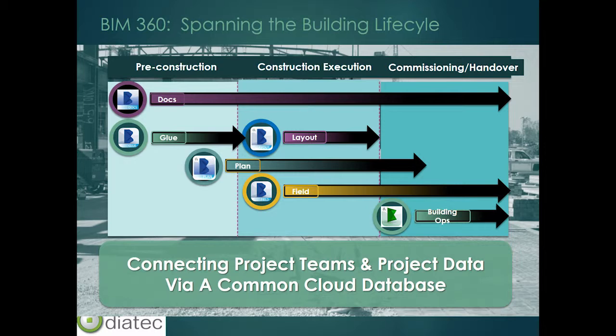Once we move to construction, Layout handles validation and verification to ensure as-built conditions in the model match what was pre-constructed, and identifies deviations on plan. Field starts to facilitate the rich data required for commissioning and handover — bringing information online for HVAC and MEP — that facility managers specifically will require to maintain and operate the building. And Building Ops takes all information generated up to this point and puts it in a format that operators, owners, facilitators, and occupants can use to manage and maintain the asset.